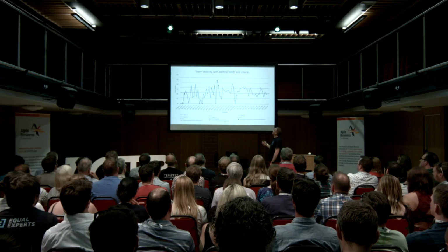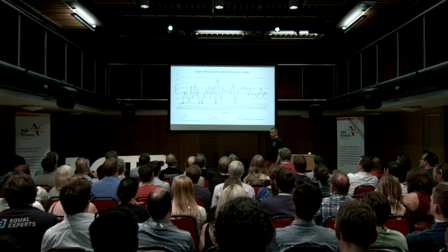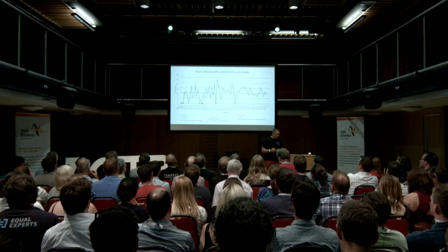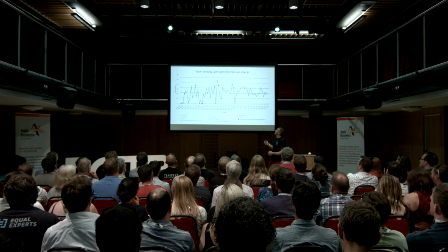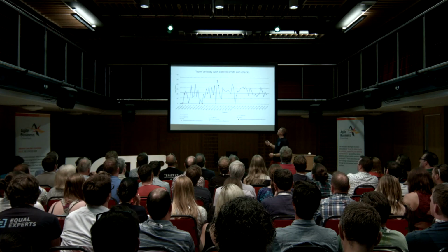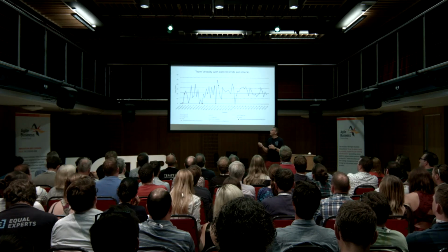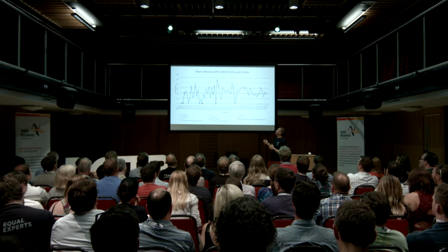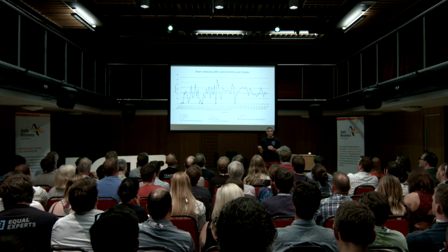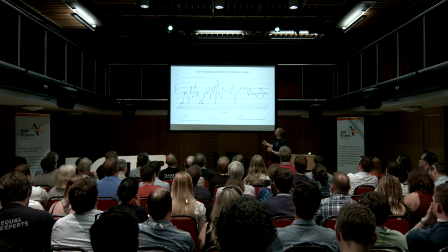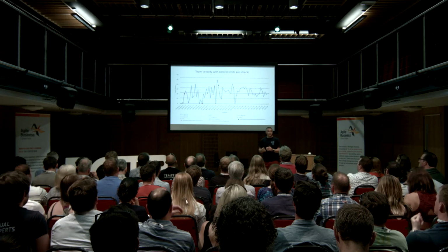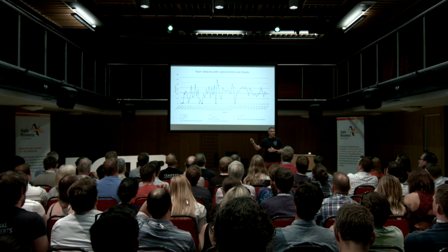We'll jump over these ones for a second and look at this one. These yellow squares are showing a trend. In this example, it's showing that there are 7 consecutive points above the center line. So this is starting to indicate that maybe we've done something. Have we done something that has caused our average velocity to jump up?